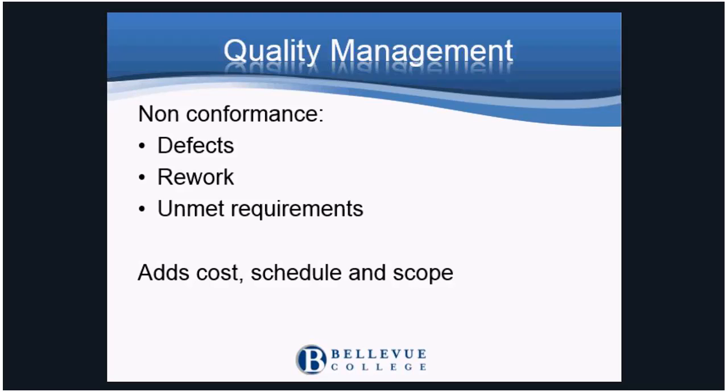Rework also represents nonconformance. If you realized the sundae had the wrong type of cream and you stopped and fixed it, the customer would get what they wanted, but you would have to spend the time fixing it. This is rework and impacts budget and schedule. Another part of nonconformance is the omission or unmet requirements. They are the features or output that the customer wants that didn't get validated and is missing from the final product. Let's say the customer wanted cherries on their sundae and didn't get them.